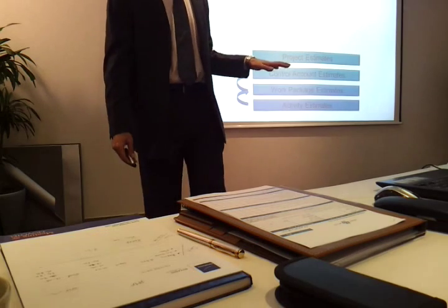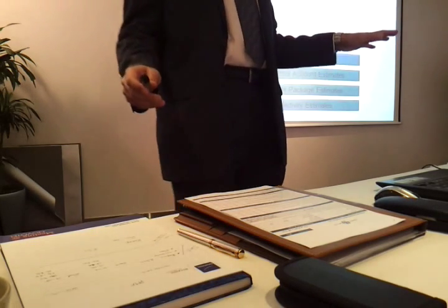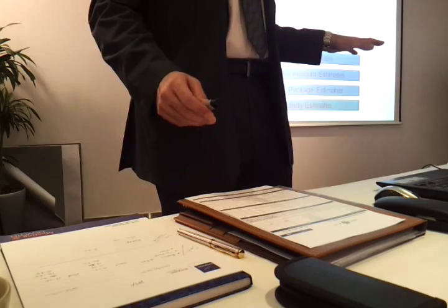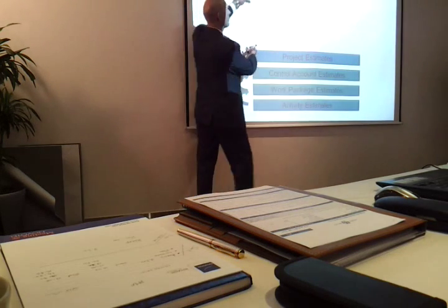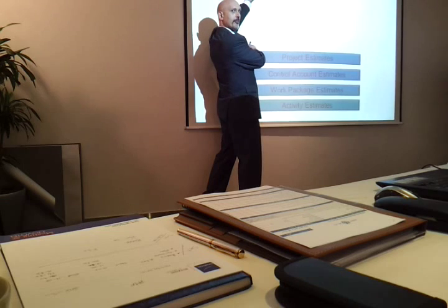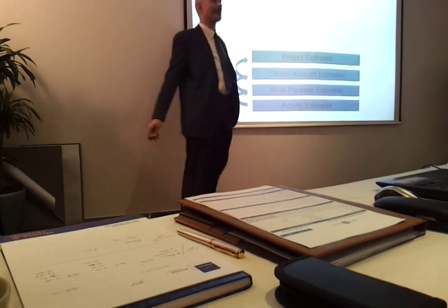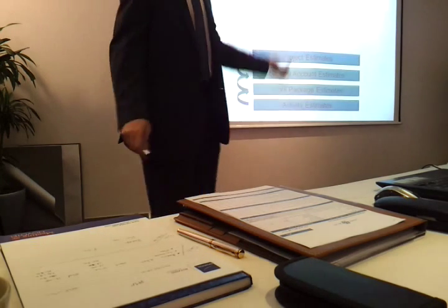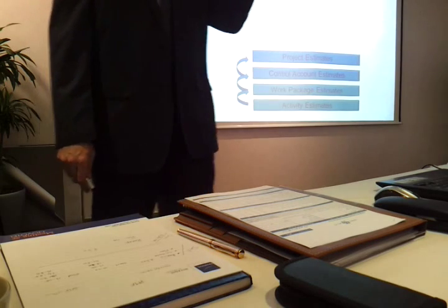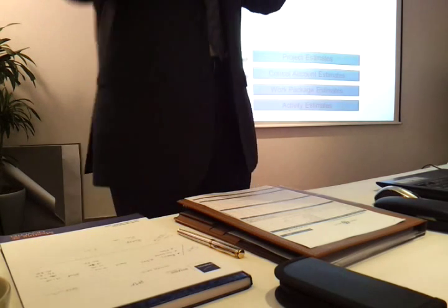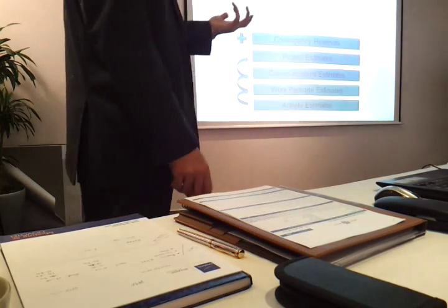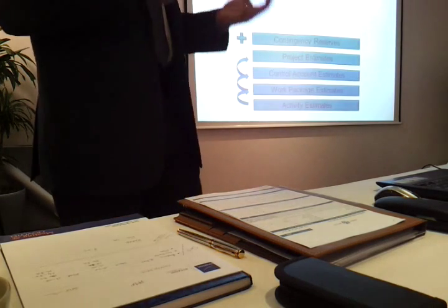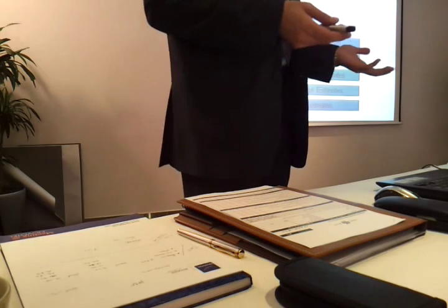Are we done here? Who thinks we're finished? No. Definitely not. Why do you think we're not finished? Because there is still room here, definitely. You must have guessed that there's something there I have to fill in, right? After I come up with my project estimates, this is good project management practice, I should add contingency reserves.